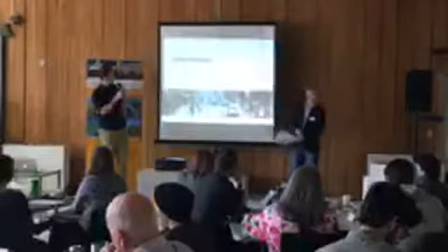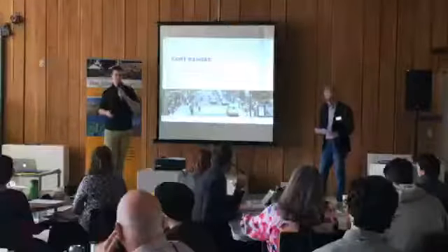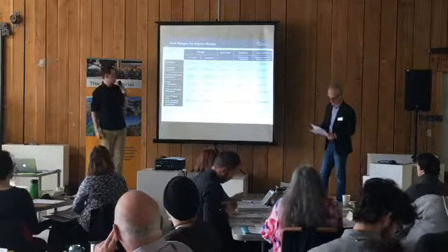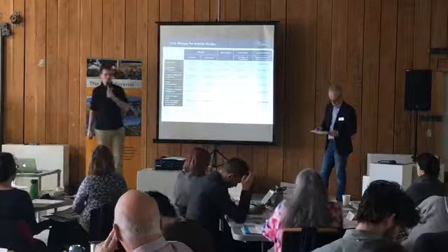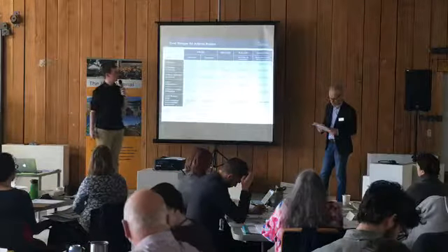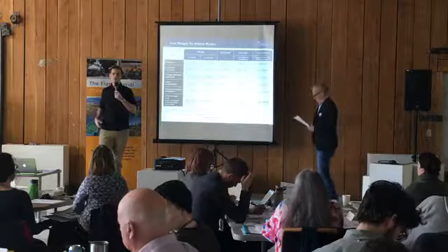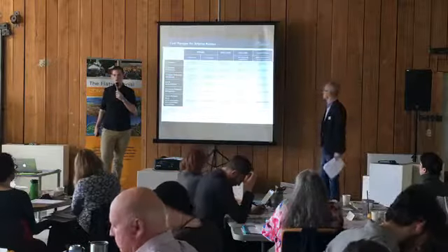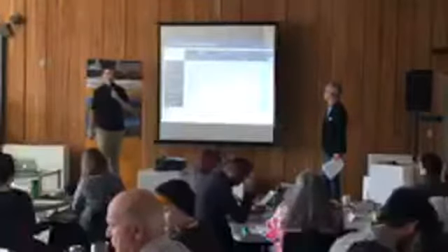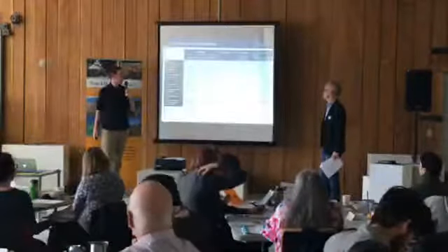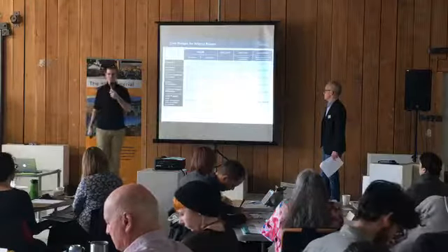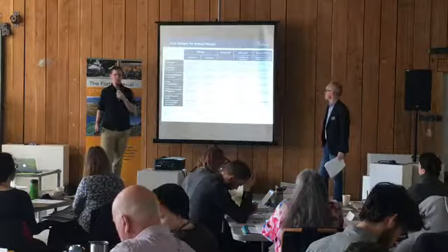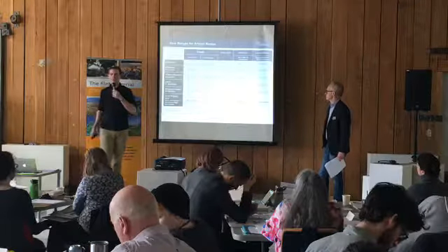Thank you. And lastly, just to go over the resultant cost estimates for each of the options. So this is for everything except the park impacts. This is all the construction and all the land. So I think the key takeaways here are Melton, William, and National all generally have higher road costs because there's a greater extent of road construction or reconstruction compared to some of the modifications to the existing Fire Street alignment. The overpass structure costs generally increase in proportion to the size of the structure. So, you know, the Melton, William, and National ones, because we're spanning so many more tracks, the costs there tend to be higher.